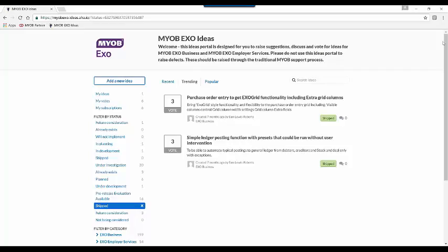As time and materials are used up on the job, in the timesheets and costs tabs, they can be assigned to the correct progress invoice. What this allows you to do, because it doesn't change the value of the invoice, is move your stock and assign it to the invoice, and it allows you to capture the true costs and profits, from your invoice to the actuals that are used up on a job.